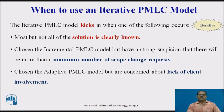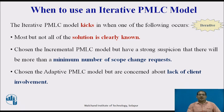We will see when to use the Iterative Model. The Iterative PMLC Model kicks in when one of the following occurs: most but not all of the solution is clearly known — that is, a few features require clarification or are not understood by the user; if you have chosen the Incremental PMLC Model but have a strong suspicion that there will be more than a minimum number of scope change requests; or if you have chosen the Adaptive PMLC Model but are concerned about lack of client involvement.